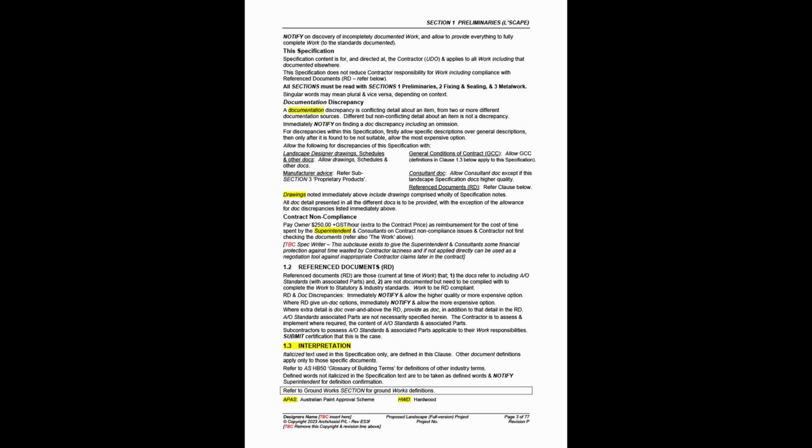Products or materials described this way become contractors' selections, governed by the preliminaries contractor material selections. Know that the superintendent can have the builder provide checking detail of anything relating to the contract, specified in the preliminaries superintendent compliance requests. Italicized defined words are used. This is done in industry contracts and in the NCC, but is rarely done in specifications, which is unacceptable. You need to know a defined word when you see it.